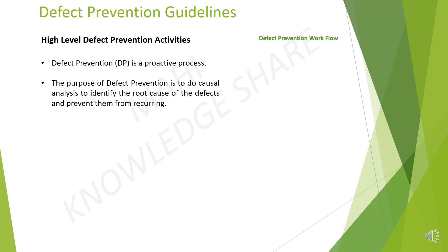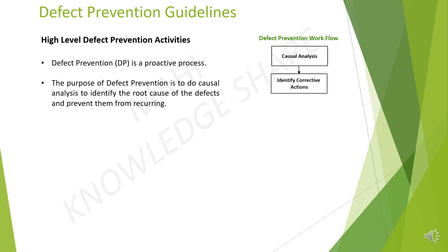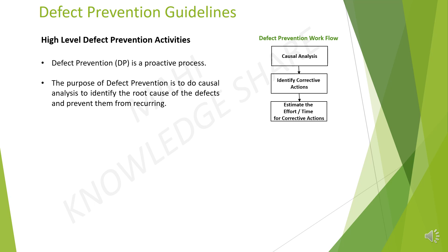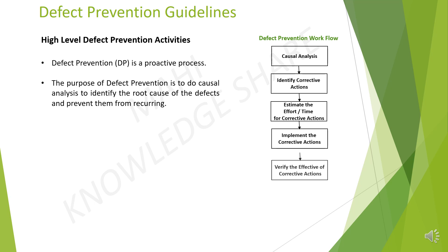Defect prevention workflow. First, it starts with causal analysis. Then, identify the corrective actions. Then, estimate the effort and time required for corrective actions. Then, implement the corrective actions. Then, verify the effectiveness of corrective actions.